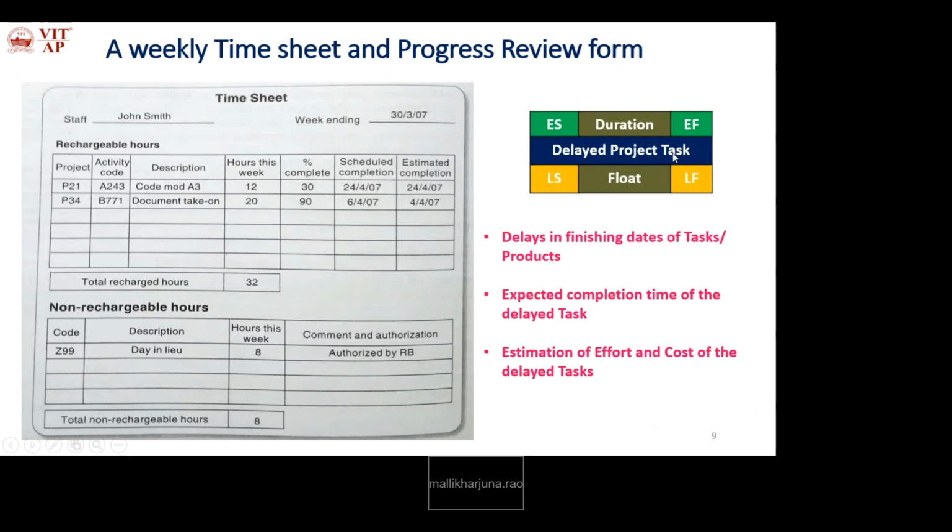For normal tasks, every intermediate task also has a weekly timesheet. But we will pay more attention to this delayed project task, called critical activities, because it may have effects on the whole development.